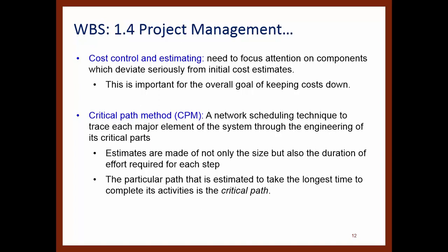Estimates are made of not only the size but also the duration and effort required for each step. The particular path that is estimated to take the longest time to complete its activities, that's what we call the critical path.